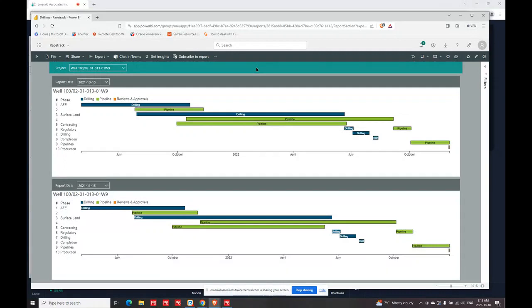Now, you can have a number of different scenarios going here. So you may be doing an update once a month, and you may be taking a snapshot after that. You may be doing updates for turnarounds and taking snapshots every day. It's up to you. And that process, as Nicole said, can be automated. So what I'm going to show you here, you don't even need to worry about doing it manually, but you can do it manually if you need to take another snapshot. And I just want you to be aware of how easy it is to do.